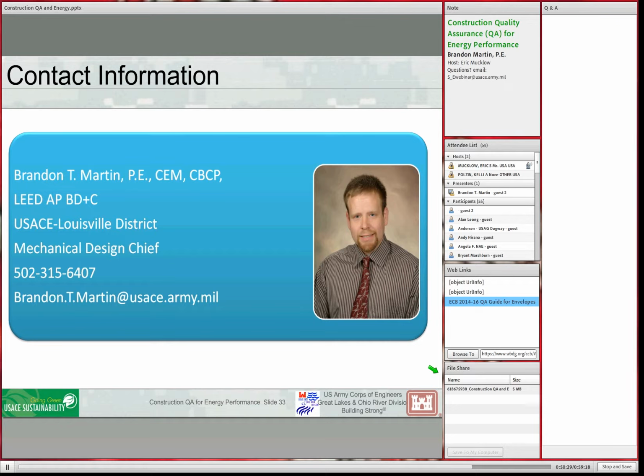Okay, there's another similar kind of question. Who pays the AE for re-engaging when the contractor has requested a deviation/variance in a design bid build project? Good. So often we have Title II services with AE firms to review submittals, and we would use a similar vehicle to get back to the AE. The funding would have to come out of Design During Construction, DDC funds.